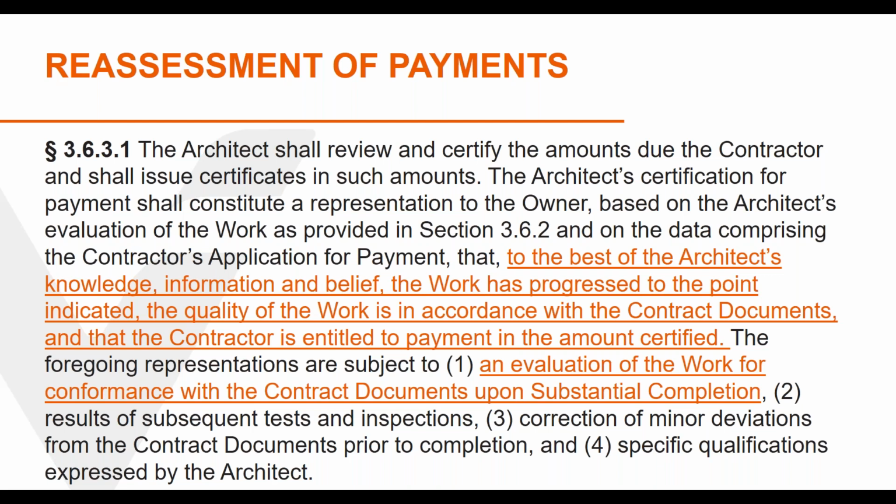Some project owners really want the architect to perform services during the construction phase as having a fiduciary duty, much like an investment advisor, an attorney, or an insurance agent, to put the financial interests of the client above all else. But even the service that an architect does in evaluating payment requests does not rise to the level of serving as a fiduciary.